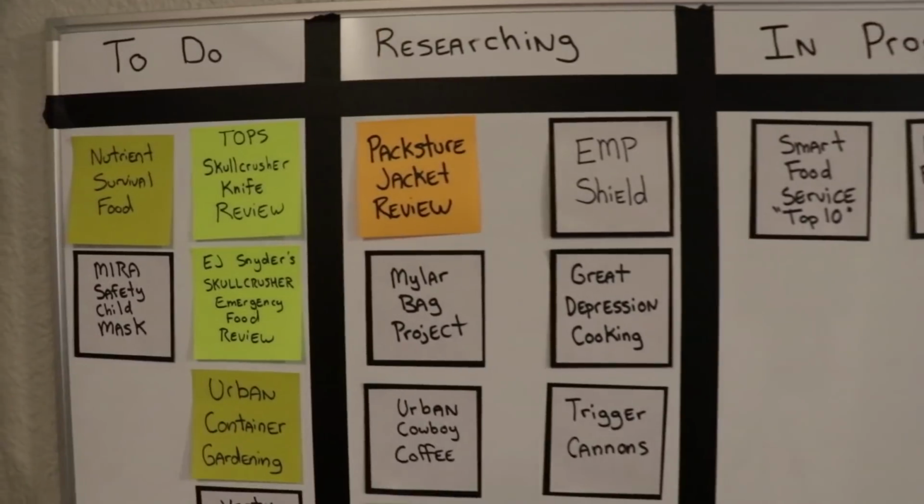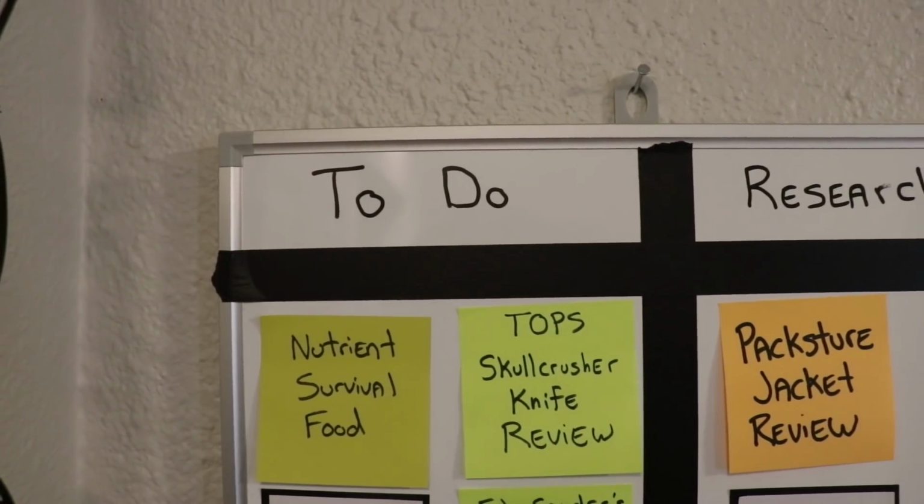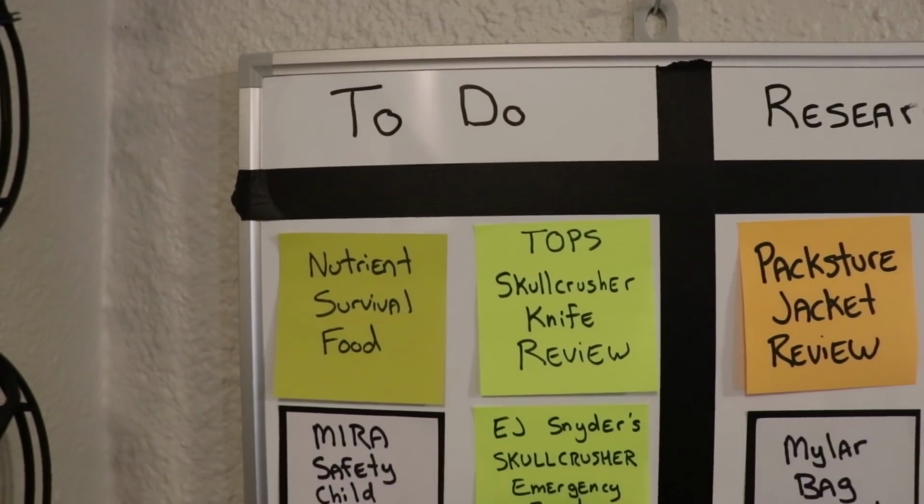In my prepping video Scrum board, I have 4 columns. I have a to-do column, so that's basically a backlog of all the items or stories that I want to get done for this sprint. For my video projects, I keep it to 1-month sprints, although for your prepping projects, you may want to reduce it down to 2 weeks.